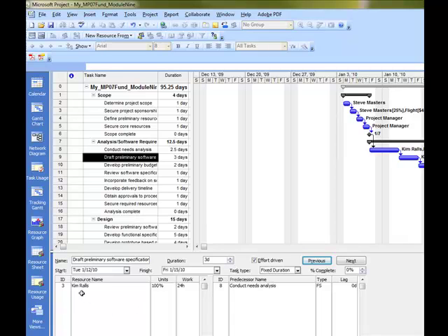So click underneath Kim Rawls, and remember what happened last time when we were in fixed units effort driven. Okay, remember what happened to duration. Now I'm going to choose Rob Young and click OK. And the units have now been reduced, right? Earlier when we had fixed units effort driven, the unit stayed the same and the duration was affected.